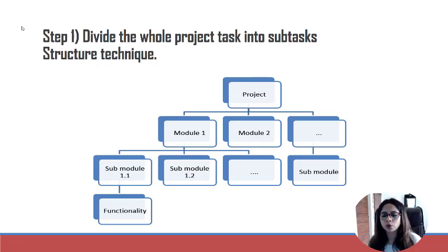So once it is broken down, the 10 days are broken down into 3 days sections. Now you take one 3 days section and you break it further into 1 day section. Now you take that 1 day section and you break it further into hourly sections. That okay, today in 2 hours I'll complete this much activity. So once you finish that 2 hours activity, now you will do another 2 hours activity, combine it. Now you are done with your 4 hours activity. Similarly, you will be doing 8 hours activity and you're done with your 1 day's activity.